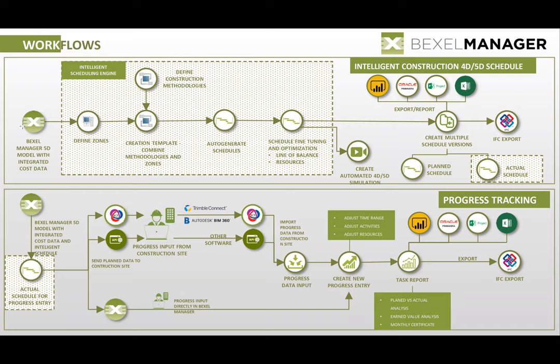So basically, with your expert knowledge, you easily define those construction methodologies. And then when you have them defined, on every particular project you can easily define zones. The system can mix the zones, like I'm going to show you in the live demo today. And then you define, let's say, certain levels in the construction schedule. Let's say the first level is construction methodology. Then you have buildings. The third level could be building levels. And the fourth one could be zones within building levels. And the system really automatically generates the schedule, which is a fully line of balance prepared and optimized schedule, which of course later could be additionally fine-tuned